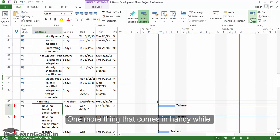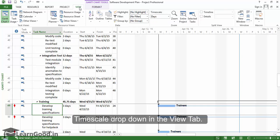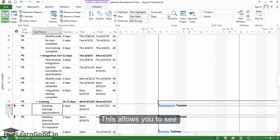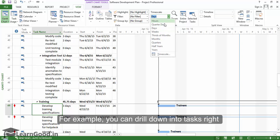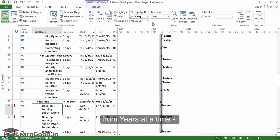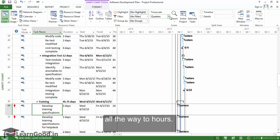One more thing that comes in handy while reviewing the Gantt chart is to use the timescale dropdown in the view tab. This allows you to see just as much detail as you choose at one view. For example, you can drill down into tasks right from years at a time to quarters, months, all the way to hours.